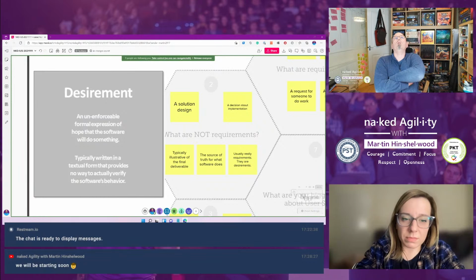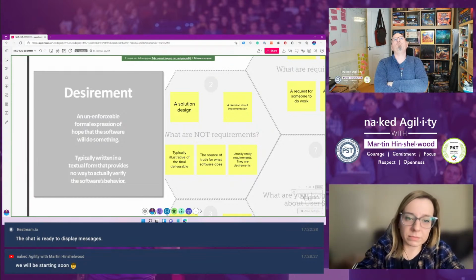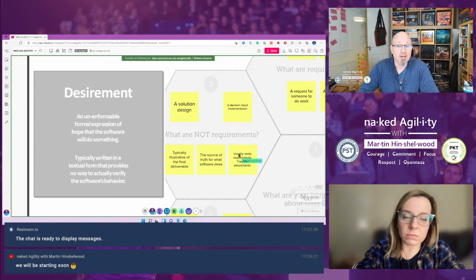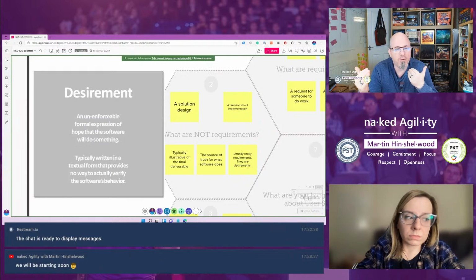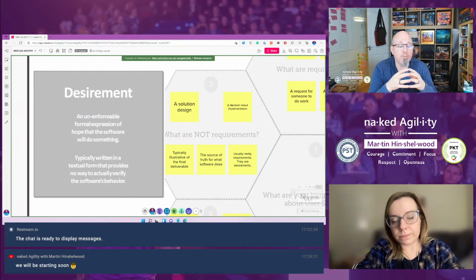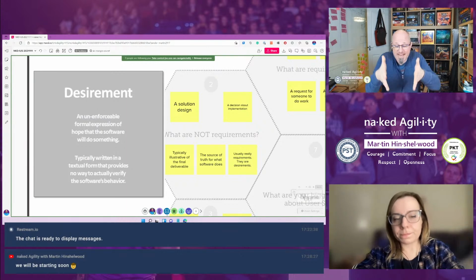Yeah. So we want to leave this. One of the purposes of user stories, that was one of the other questions, is why do we want to use user stories? It's because we want to leave the implementation till as late as possible, so that we reserve the right to change our mind. If we have the implementation defined in the requirement, in the thing that we're being asked to do, that almost always locks us into one solution that might not be the right solution when we get into actually doing it.